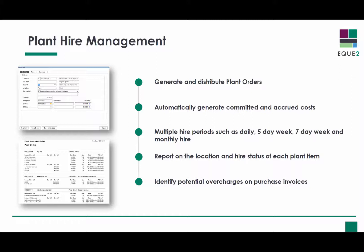Accrued costs are automatically generated against each plant item using multiple hire periods such as daily, 5 day week, 7 day week and monthly hire.